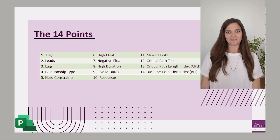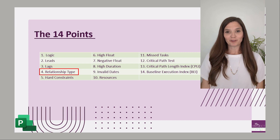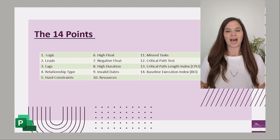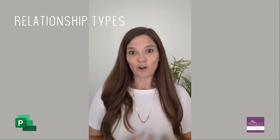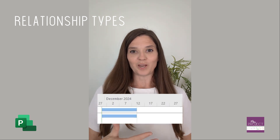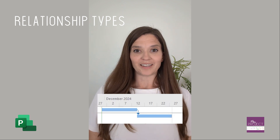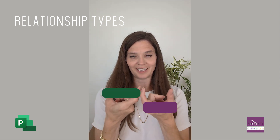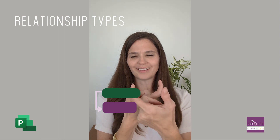The fourth DCMA point assessment is relationship types. We talked about logic, which has successors and predecessors — every task has to have a relationship, but that relationship can be defined differently. Finish-to-start is the most common and is the default when you first link a task. You can change that to say both tasks start at the same time — that's a start-to-start relationship.